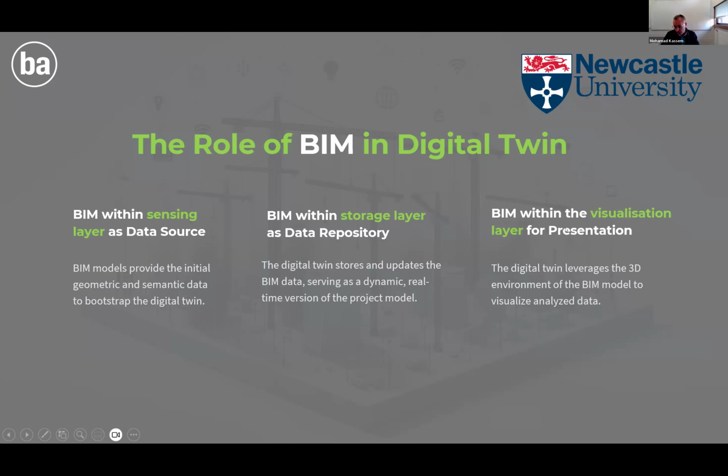If you look at earthwork equipment on construction sites, the utilization ratio is really low, as low as 30%. There's lots of duplication and redundancy, up to 5 times. And these data are actually from one of the largest civil engineering projects in the UK, HS2. Also in terms of emissions, they cause lots of emissions. For example, in and around London, they make up nearly 12% of all NOx emissions. So it is really considered one of the biggest productivity blind spots in the construction sector, the earthwork productivity issue. So it's really important to target.